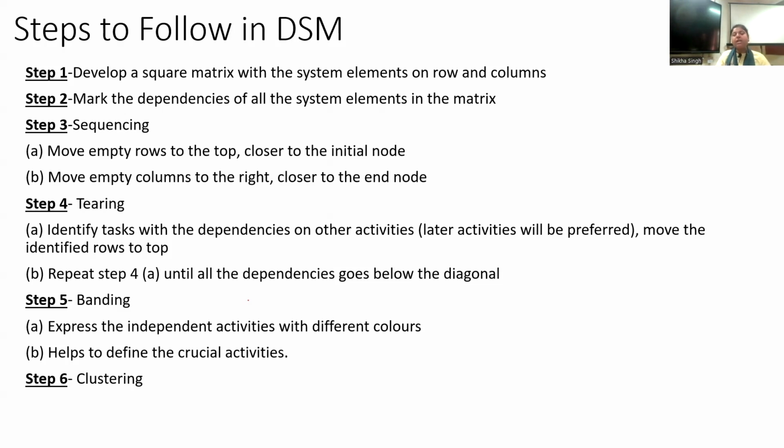Let us say some electrical subsystem is dependent on the software system or the mechanical subsystem, right? So if this dependency is there, it means I know that I need information from the software system or the mechanical system. So I will work closely with those two subsystems, right? So this is called clustering: the electrical system will be working closely with the software subsystem teams, working together hand in hand, receiving the information, processing it, giving it back. So that kind of clustering is also required, because this is also part of optimization, right?